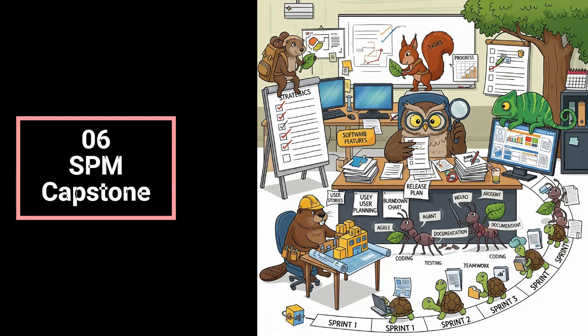And week 3 keeps going. Assignment 3.11, iteration plan for sprint 1. Right, so now the dev team gives you their initial plan for just the first sprint. Okay, so more detail. Much more detailed, breaking down user stories into smaller tasks, estimating time for those tasks, assigning developers, and your job as the product manager is to give feedback on their plan. So it's collaborative, not just top down. Very much so. That's core to Agile. The dev team has a big say in how the work gets done sprint by sprint. The lessons cover task time estimation, dependencies at this finer level, and what an iteration plan actually looks like.